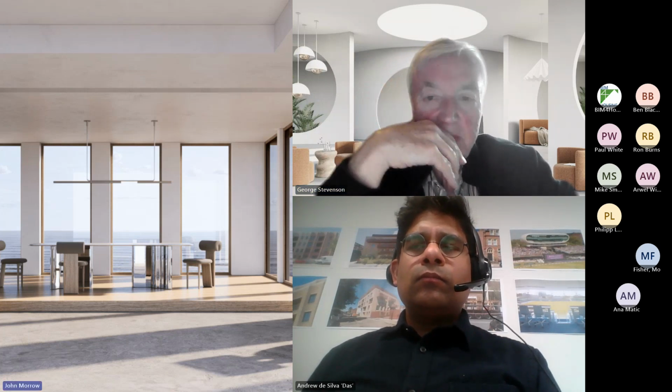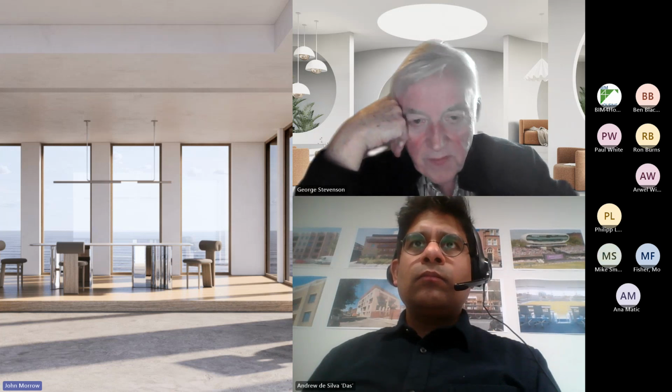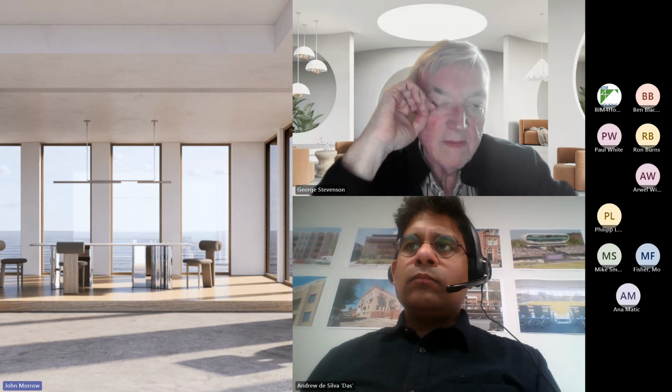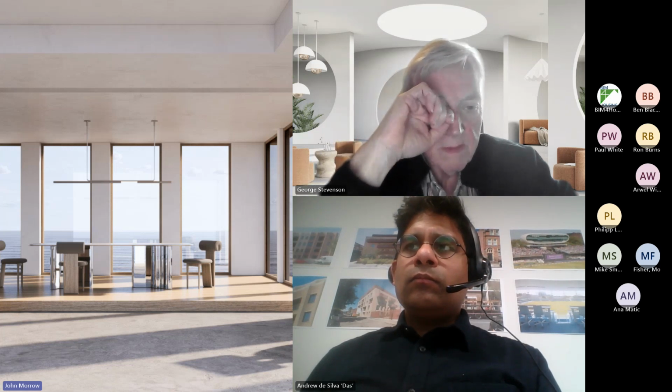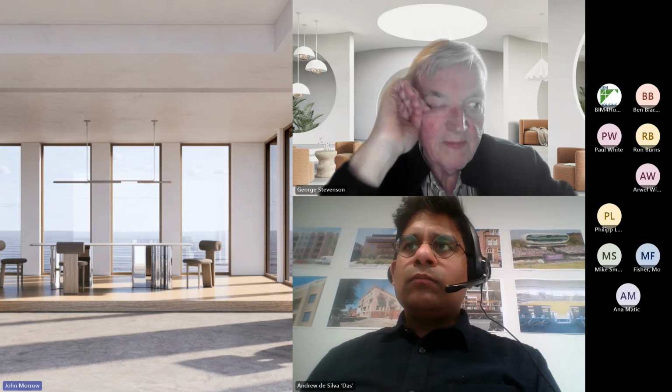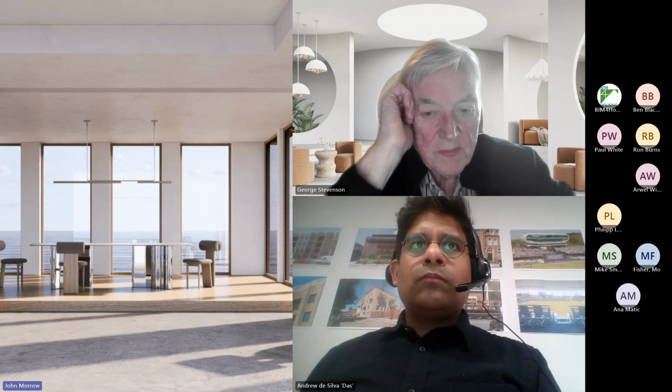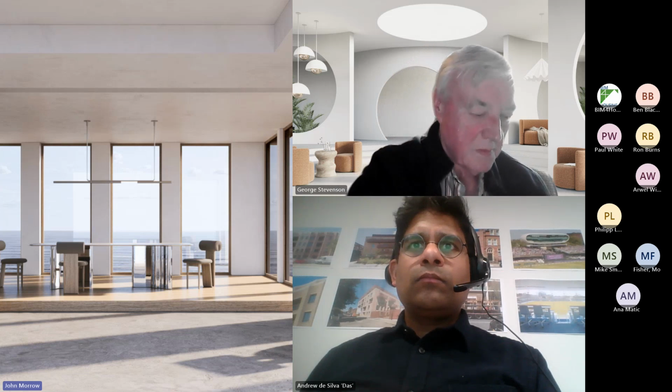I was just going to add to that, George. Thank you. Retrieving the information in a timely manner is like pulling teeth. And what we have found is that the templates and those methodical checklists that we use, we put them into our contracts on our AFLs to make it a legal requirement for them to provide that information prior to PC happening.